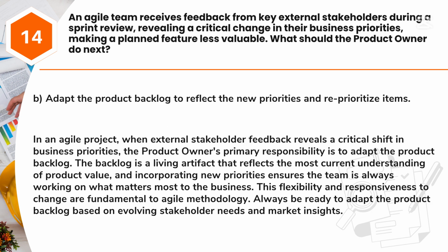Answer: B. Adapt the product backlog to reflect the new priorities and reprioritize items. In an Agile project, when external stakeholder feedback reveals a critical shift in business priorities, the product owner's primary responsibility is to adapt the product backlog.